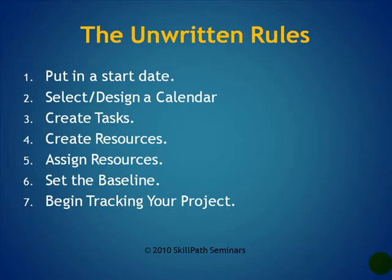Create your tasks. Create your resources. Assign those resources to tasks. And then at that point, you need to save your baseline. I'll show you that in a moment. And then from there, you can begin tracking your project.